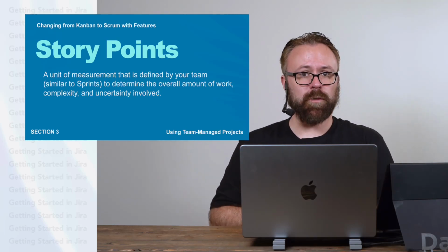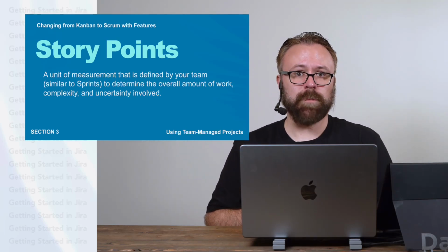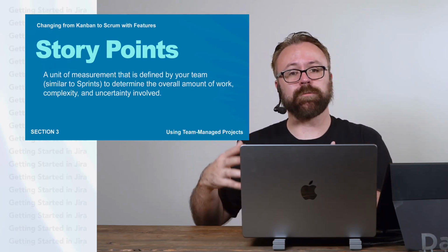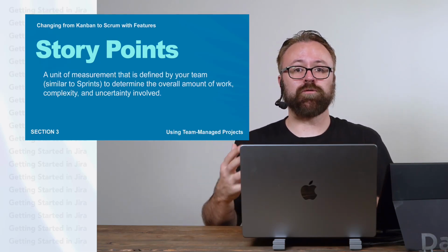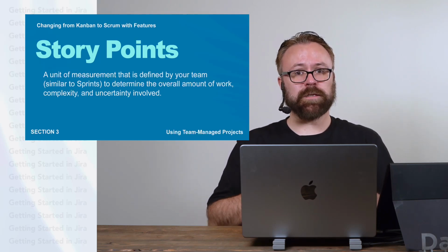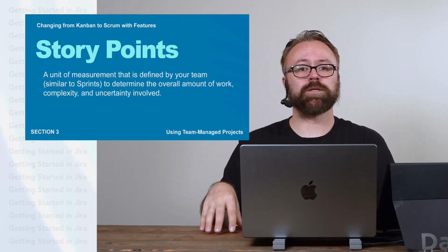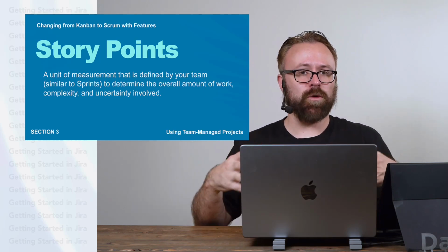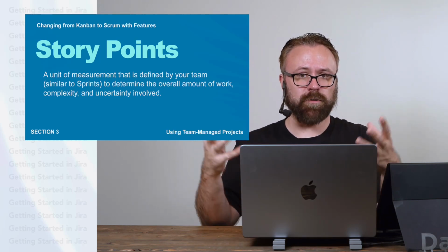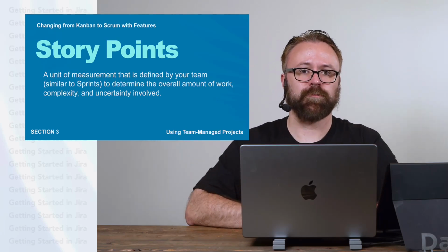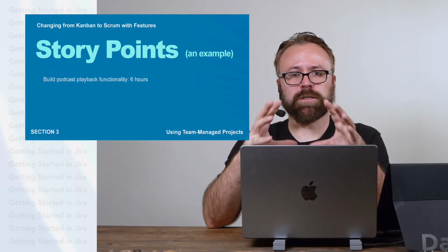Maybe a sprint is 1 week, maybe it's 2 weeks, maybe even a month. The term sprint is defined by your team to mean something. The same is true for story points, but instead of being the time to get work done, like a sprint overall, the story points refer to how much effort it will take to get something done. That also includes the time itself, but therefore for the issues instead of the overall sprint. So it goes beyond just the time estimates.